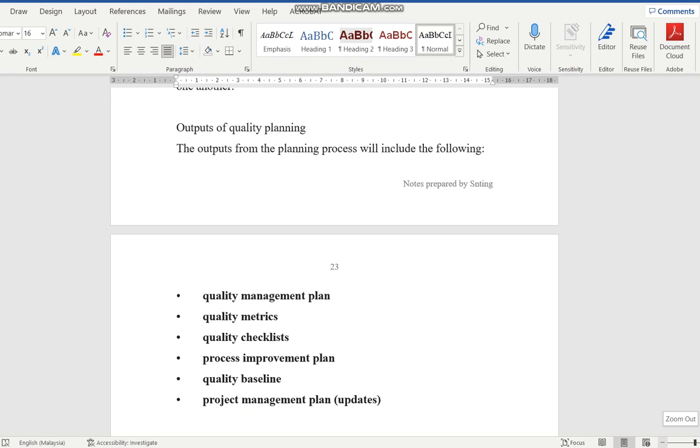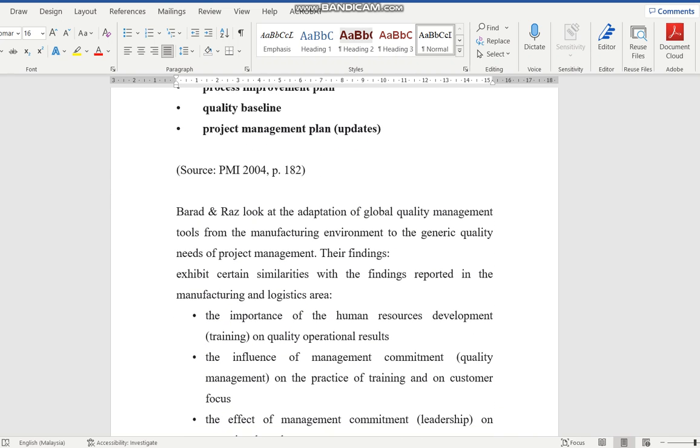And I think essentially we are looking at also incorporating what we're going to talk about in the next stage, quality assurance. You see, you need to plan your checking, you need to plan your tests, you need to plan your acceptance criteria, you need to plan your monitoring within your planning. You need to set all this baseline first, and then if that doesn't happen, what is your plan B or plan C? And how do you update this management PQP, and how does that incorporate into your overall project management plan?